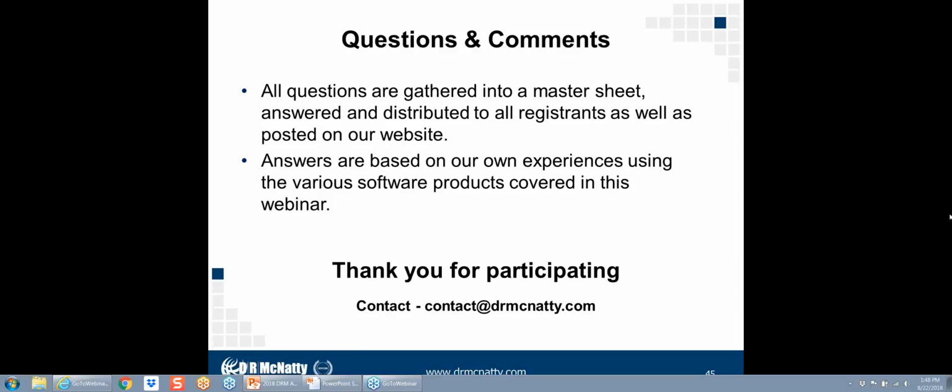Sure. So when you buy the full license of P6, which is considered EPPM, you do get a Team Member access license to it. So you can also purchase a P6 Team Member only license. But for Team Member to work, you do need EPPM set up and running because it has to be configured through EPPM. If you just buy a P6 PPM or the professional only license, Team Member does not come as part of it. It does have to be the full P6 license to get that Team Member.